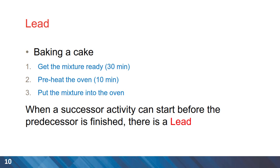This is a negative lag and we can illustrate this using an example of baking a cake. In the first activity, we need to get the mixture ready and it takes about 30 minutes. And the second activity is preheating the oven for a duration of 10 minutes. A good point about activity two is that we don't need to wait until the first activity is concluded or finished until we start the oven. So we can do parallel works in here and save some time. This is exactly what lead means.